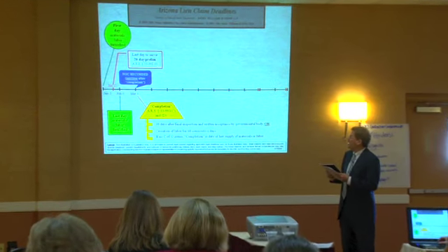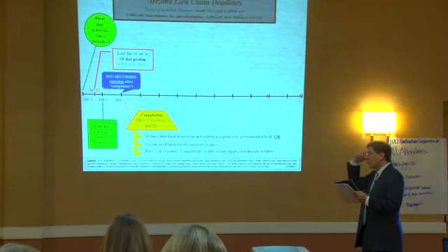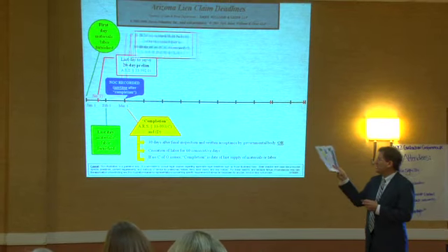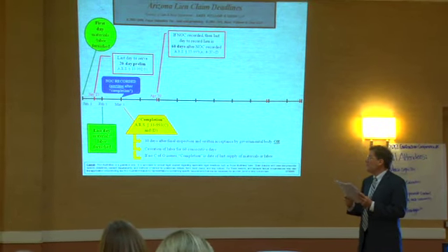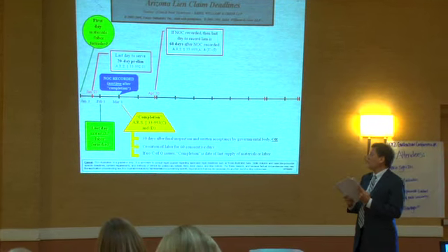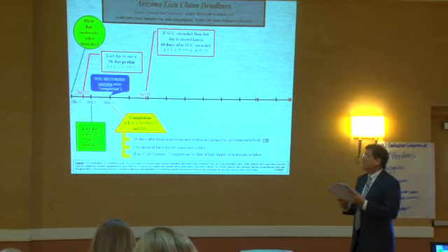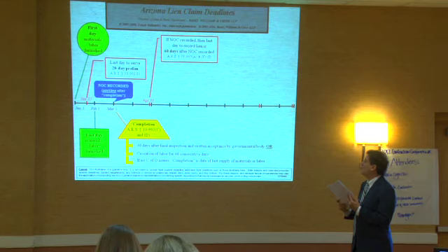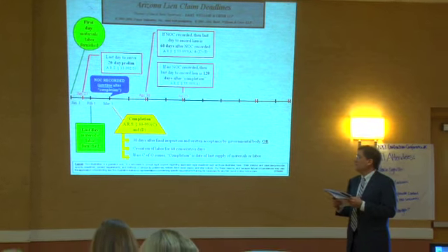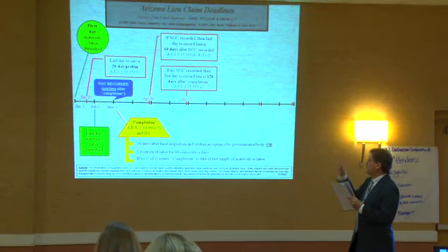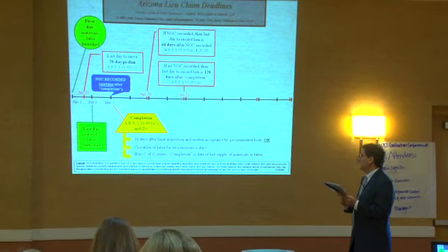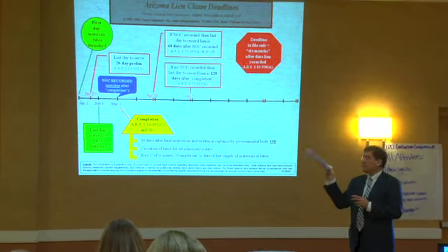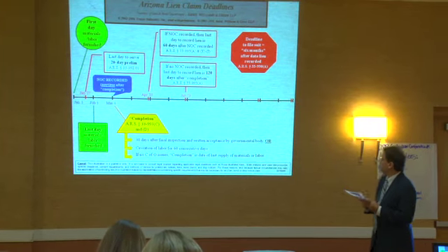Now, hypothetically, a notice of completion is recorded March 1. As you can see, it can be recorded any time after completion. If on March 1 a notice of completion was recorded, then you have 60 days after that NOC is recorded to record your lien claim. If no notice of completion was recorded, then the last day to record your lien claim is 120 days after completion, in this hypothetical, June 29th.